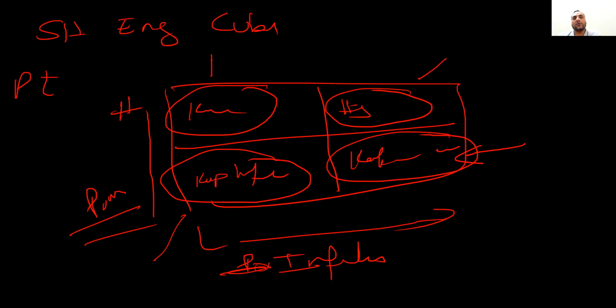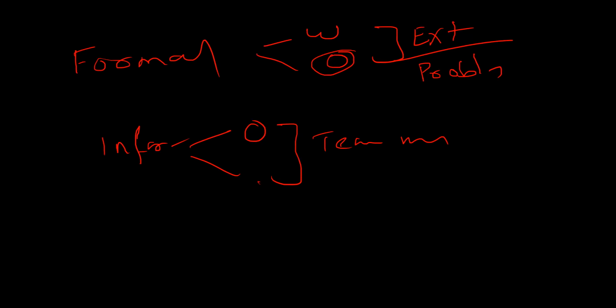There are two types of communication, formal and informal, and they both have written and oral. Formal will only be used when you are communicating with external stakeholders or there is a problem. Internal is between your team members. Formal written is like contracts. Formal verbal is like meetings and presentations to the customer. Informal verbal or informal written is like with your team members; emails are informal.